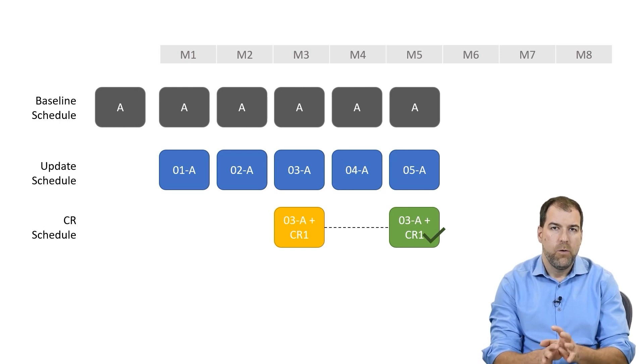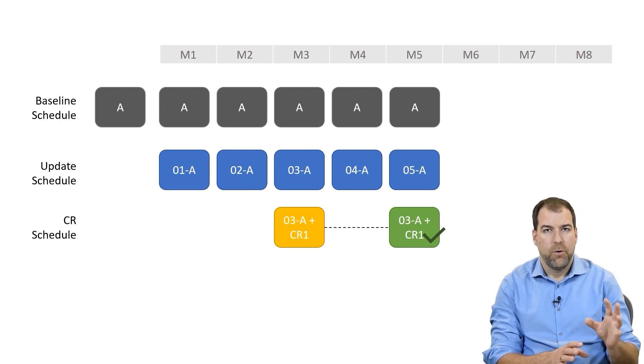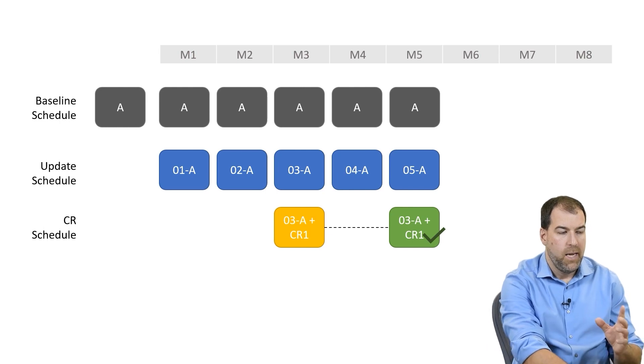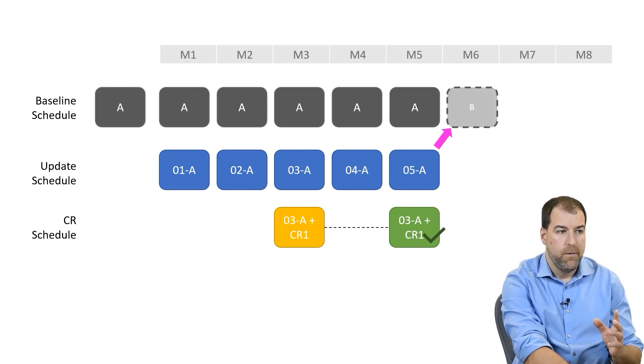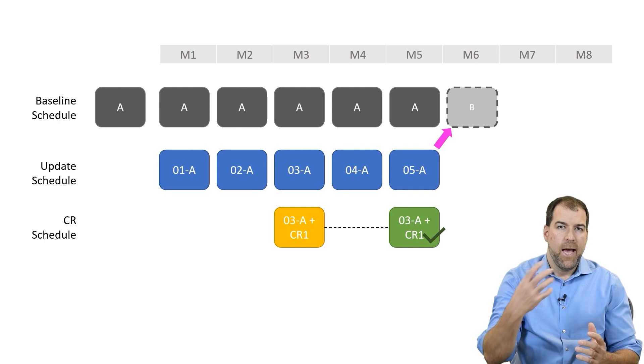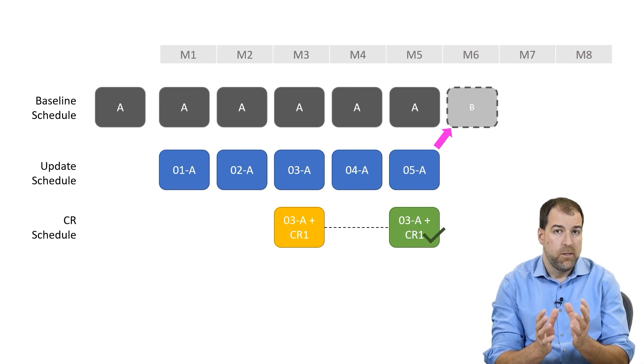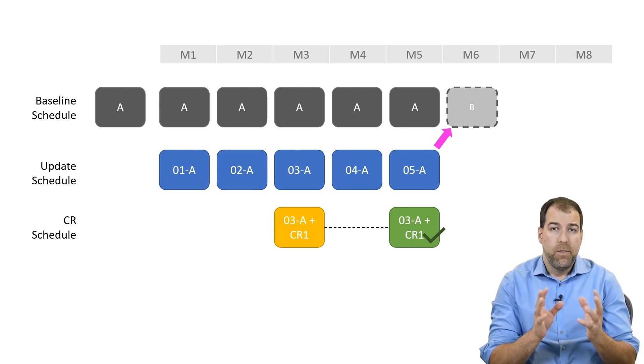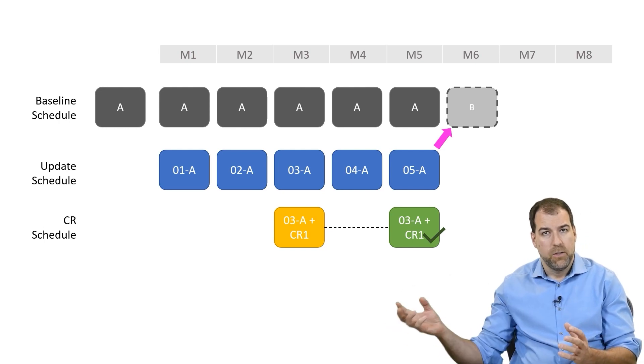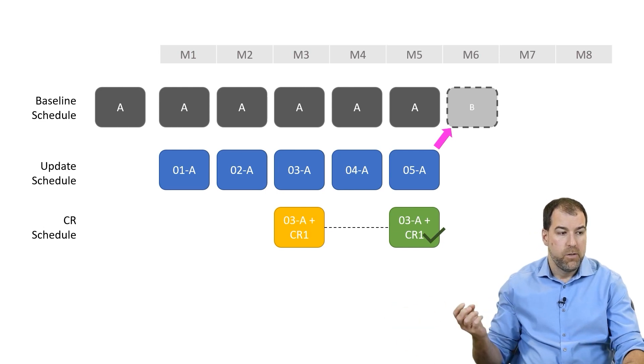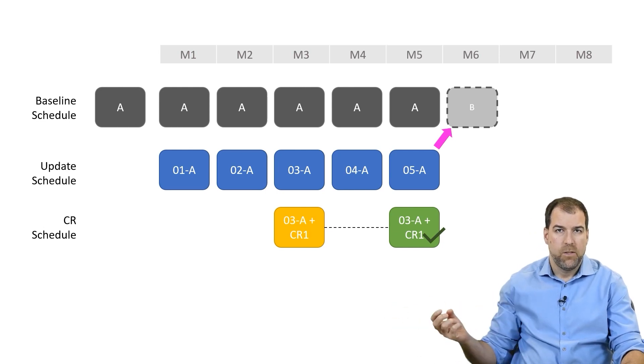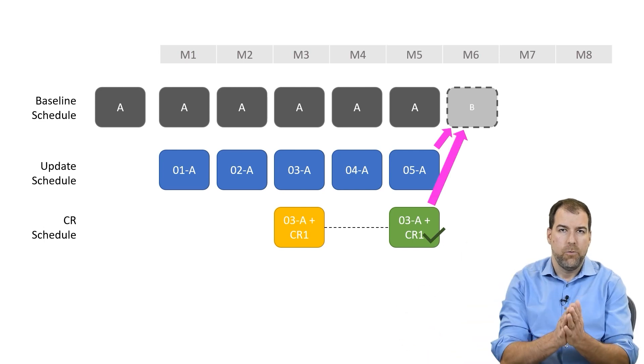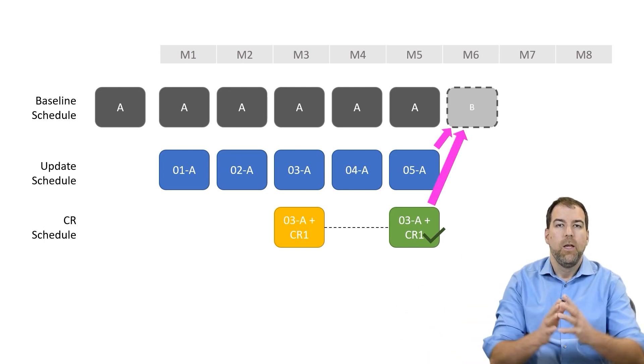Number one, we should take the current update schedule. So we should take update schedule 05 and use that as the foundation for our new baseline. But then, we should also get the change request frag nets and grab those from this change request schedule that got approved and also include that into the baseline schedule.